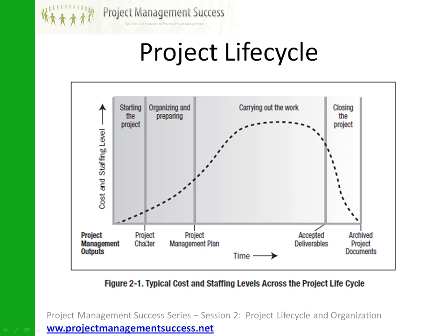As you can see, you have some key project management outputs along the way. The project charter at the start, the project management plan at the end of that organisation and preparation phase, the actual deliverables of the project after carrying out the work, and then closing off the project, you have archived project documents at the completion.